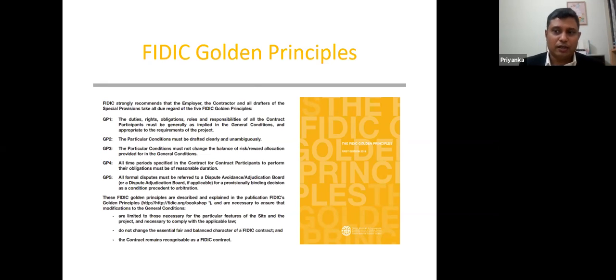Why do we put it like that? If there is a legislation change within those 28 days, the contractor should not be bothered about that, because he clearly draws a line. This is the date for me to price, because within those 28 days he is very busy with pricing the document, compiling the things, getting quotations from the subcontractors. All these things are there. So if something happens between that particular base date and the submission date of the tender, it is considered as something which has happened after signing of the contract. So that is very important. All time periods specified in the contract for contract participants to perform their obligations must be a reasonable duration.